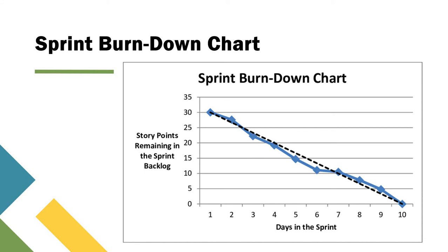the sprint backlog gives you the track of the total work remaining at least at every sprint review. So the product owner will compare the amount of work remaining with previous sprint reviews to assess progress towards completing the projected work by the desired time for the goal. This information is also shared with the stakeholders.